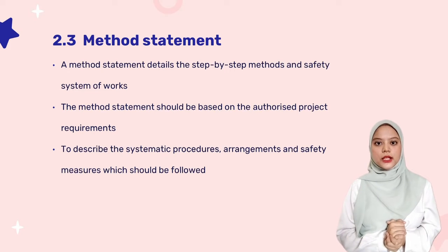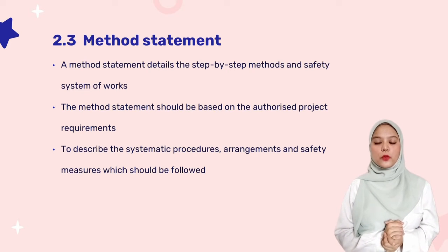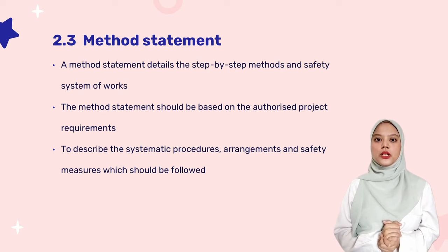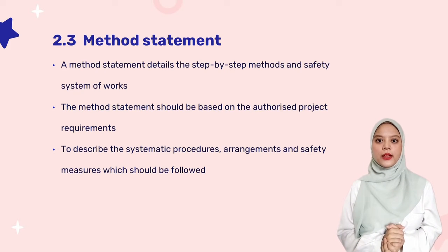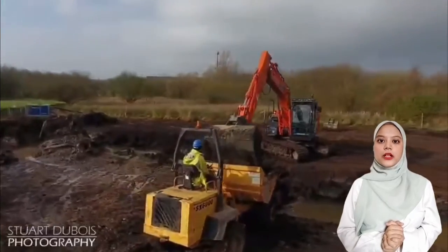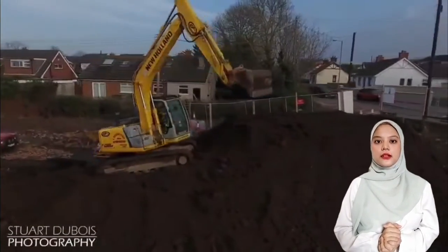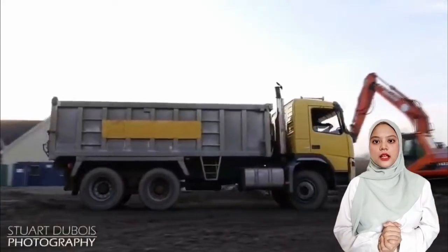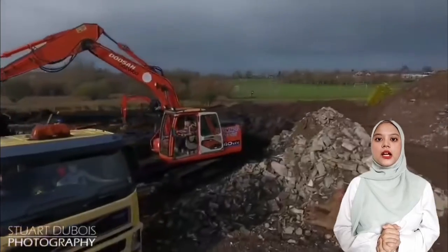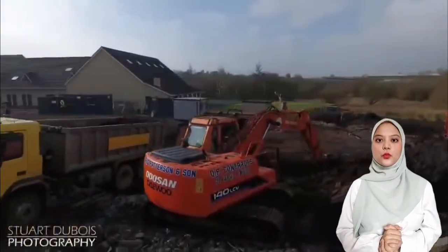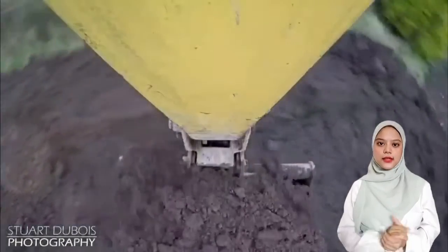This work method statement covers the clearing works on our project, which is Pembinaan Sekolah Baharu, 36 Bilik Darjah dan Lain-lain Kemudahan, SMK Taman Saintek 2, Pasir Gudang, Johor. This method statement will involve the removal of existing material, waste, existing structures, uprooting of trees, topsoil stripping and laying, prior to the initiation of the earthworks and structural work within the boundary of the construction site.